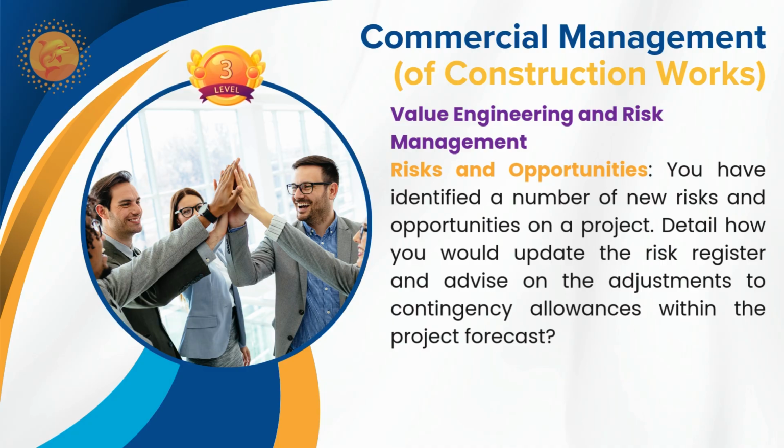So in that case, they will see what risks were already listed out by the tendering department. And they may come up with more risks or more opportunities they can use to reduce the cost. Maybe some construction method that will reduce the cost, but still you will be able to deliver the same specification requirements. Those kinds of things like having a batch plant.